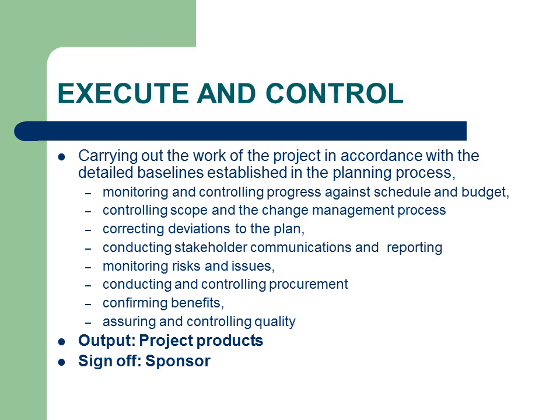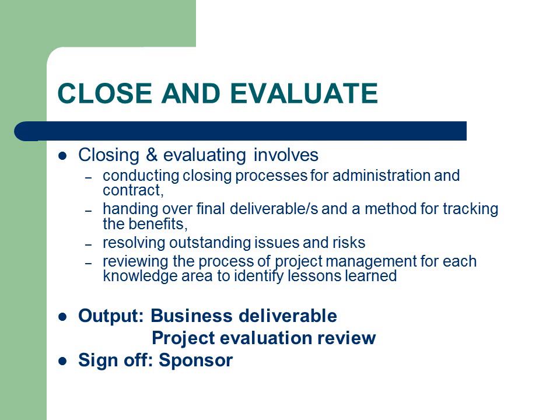The final outputs from this phase are the project deliverables, that is, the products and services that will be handed over to the customer. Close and evaluate. Projects must be closed down in an orderly manner. This phase is often not done well. The result is that finalization activities are left undone when project staff move on to new challenges, resulting in an unhappy customer and a negative impact on the success of the project.